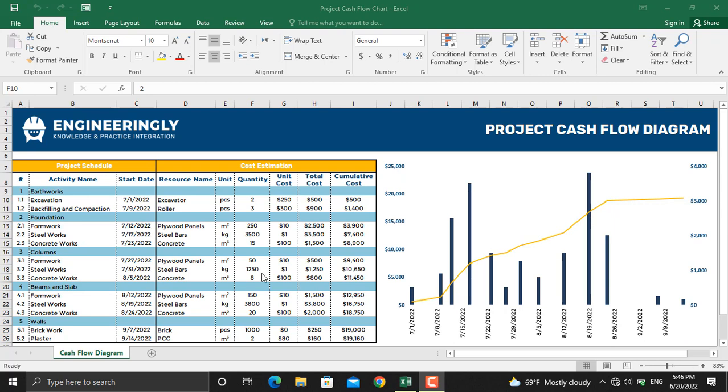In the table here we have the project schedule, the work packages, and below the work packages there are the activities. Then we have start dates for each activity. On the right table here we have the resource assigned for each activity, the measuring units of each resource, the quantity that we need for the project, the unit cost of the resources, and the total cost.